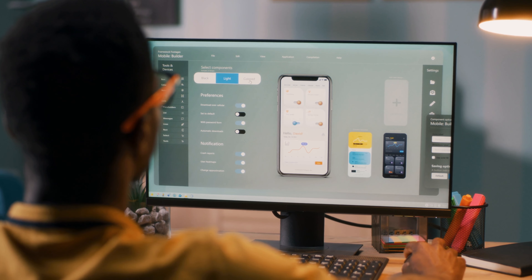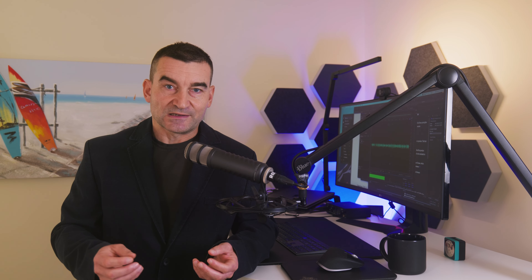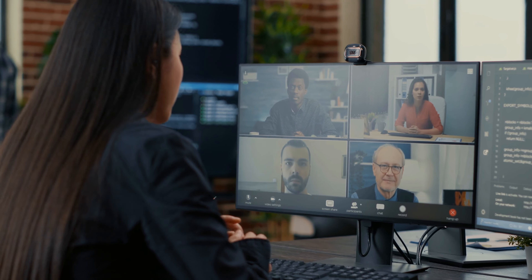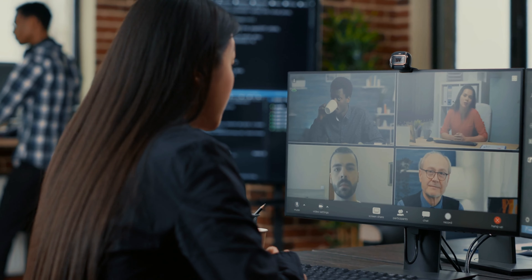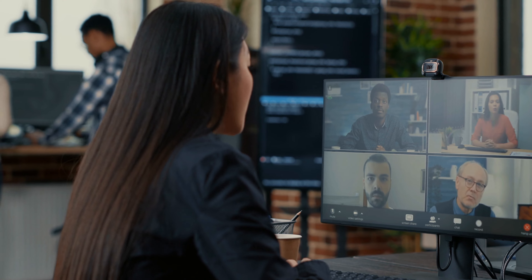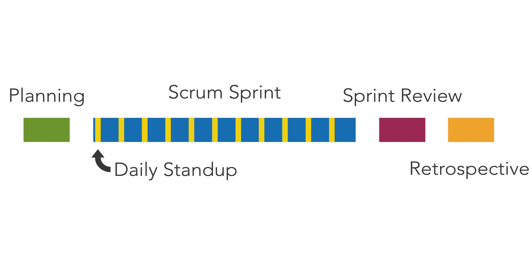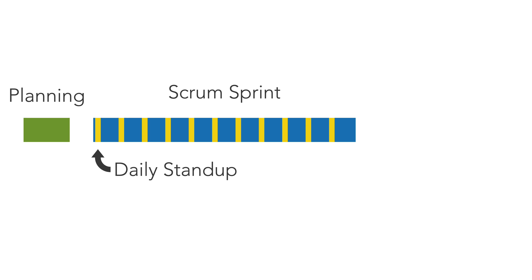Every sprint should result in a potentially shippable product increment, meaning that the product contains new features to show to customers. At the end of each sprint, there's a sprint review meeting for the development team to showcase what they have built, usually in the form of a product demo. The customers and other stakeholders get a chance to check out the new features and provide their feedback. Direct feedback from customers is a valuable input into the product development process. The sprint review meeting is followed by a retrospective meeting that goes over what was done during the sprint and what could be improved. This meeting is not about finger pointing, but instead about identifying issues and coming up with constructive solutions. Then the process starts over again until the project completes.